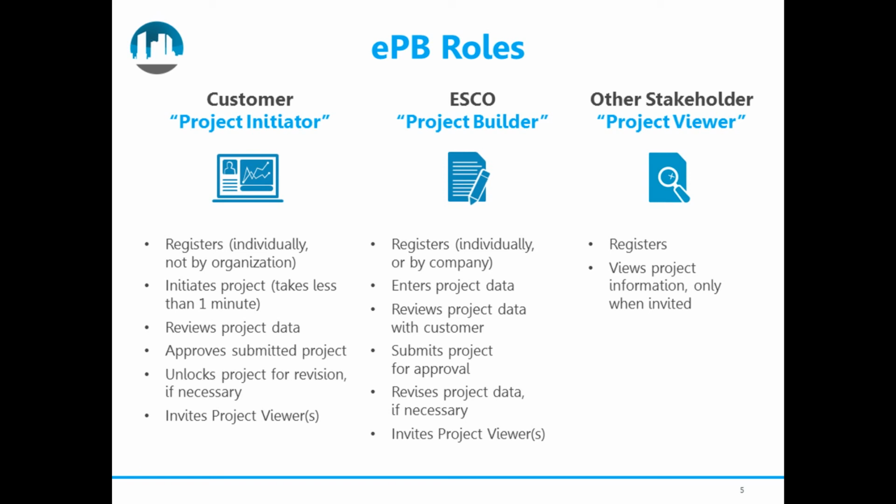And then the customer and the ESCO are going to iterate probably offline as the IGA proceeds. Once the customer and ESCO are ready for the ESCO to input some data into the system, the ESCO may be inputting data to generate some proposal schedules that they may want to drop into a proposal or send to the customer. But in any case, once the ESCO uploads some data and clicks the Submit button, the customer can then review that data and decide whether or not it's time to approve it and commit it to the database. So that's the customer role.